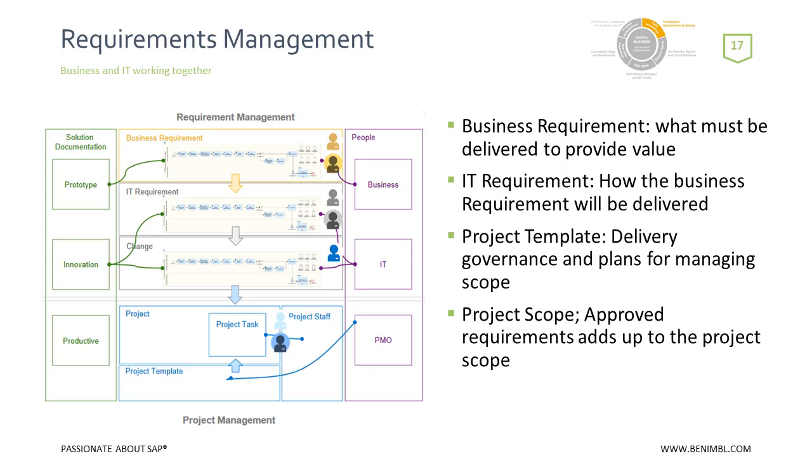All right. The next module, which again is new and drives the whole point of requirements to deploy, right? So in Solution Manager 7.1, there was no way of capturing requirements. It was only helping the run side of the house, really not helping the build side of the house. Now you have requirements management, and you are able to capture business requirements. Business requirements become IT requirements, which can go through an approval process. And then once they're approved, they can then be submitted to the project team for creation of a project.